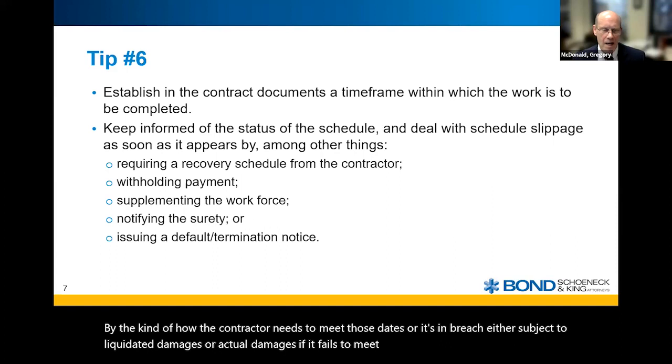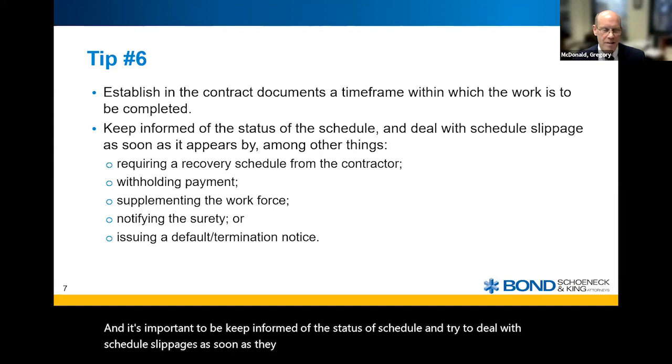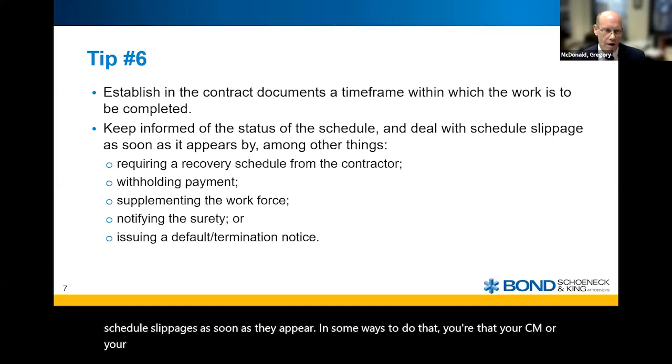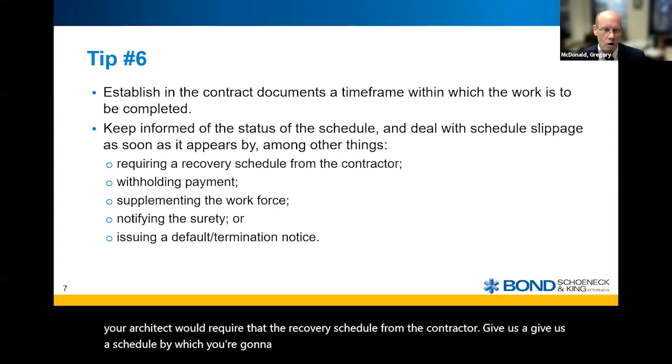And it's important to keep informed of the status of the schedule and try to deal with schedule slippages as soon as they appear. In some ways to do that, your CM or your architect would require a recovery schedule from the contractor: give us a schedule by which you're going to recoup the lost days you incurred because you only had 5 people there instead of 20 people there.